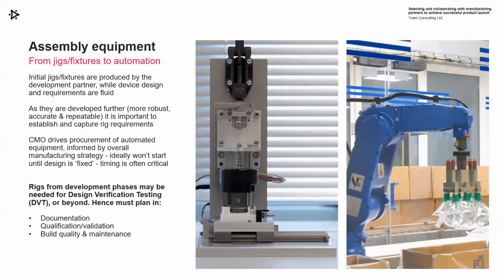Also bear in mind, rigs from development phases do sometimes need to be used during things like design verification testing. Not necessarily ideal, but sometimes situations dictate that. So if that's the case, make sure you're planning in the documentation for those rigs, the qualification and validation methods, and things like build quality and maintenance.